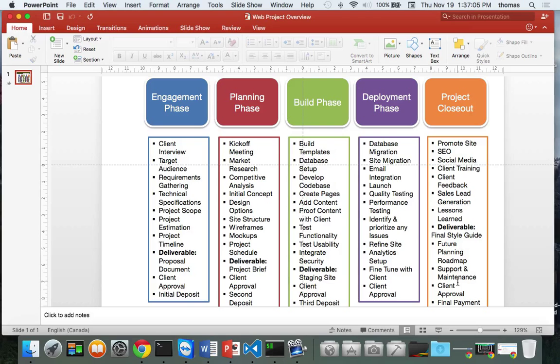Like, when you're doing the survey site, out of scope is a survey that's very open, where you can do whatever you want in the survey. That's out of scope. What's in scope is the ability to do 1 or 2 different survey templates. In scope and out of scope: stuff you're going to do and stuff you've definitely decided not to do, right? For your project. And then start estimating.